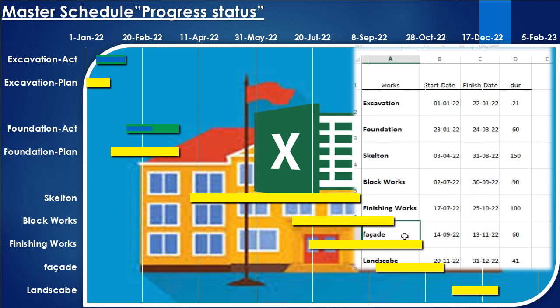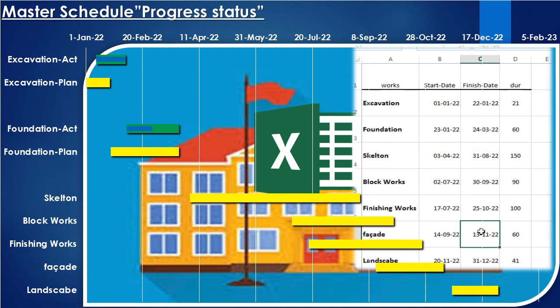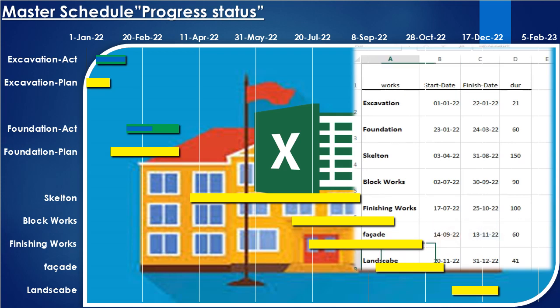Then the finishing work begins after the brick works start with a period of fifteen days and ends after the brick works end by twenty-five days. Then the facade work begins after the completion of the concrete structure with a lag two weeks after the completion of the concrete structure with sixty days execution period.